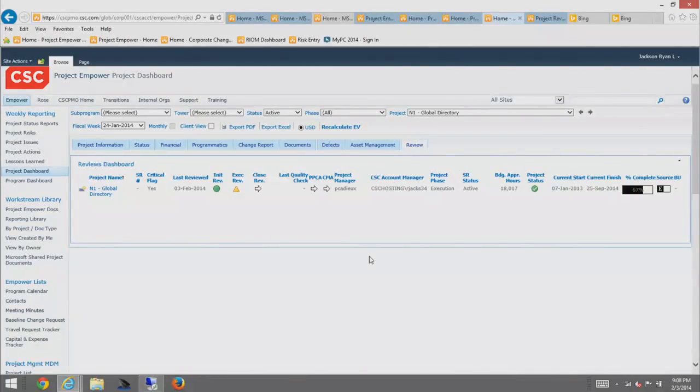So you have SPI and CPI. Project can be kind of finicky about calculating those. You have 6,000 projects, so how do you enforce using the earned value? The SPI values, I left that out. That's not out of Project. We calculate our own SPI and CPI a bit differently than Microsoft Project. We've got a project management framework that our project managers have to adhere to. That's part of our standard processes. The specifics around earned value are a bit different, specifically around how we do it for the government. So the rigor behind the scenes is a bit different from Project.